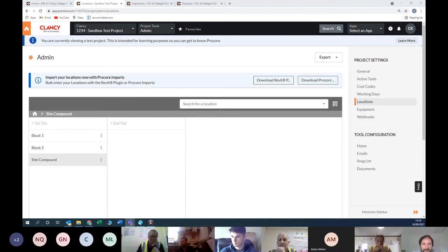So it's really good. Even on a project that we're on, we're using the QR code. We've actually given it to the door manufacturers. So we're using Carl Joinery for the stores. When they have the door manufactured with all the ironmongery that we're adding, we're getting them to add the QR code in the factory. They take a photo of it showing that all the ironmongery is on, and that's their part of the bargain done. And that QR code is actually on the door when it comes to site,